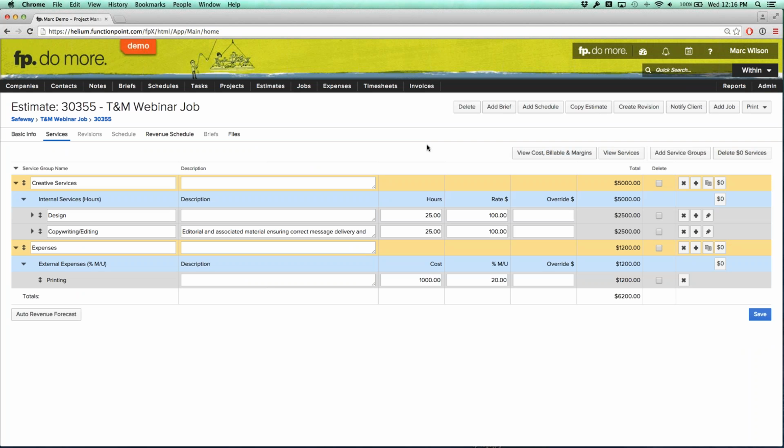One of the first things I do when I'm looking at an agency system is I do a job find for active, and I look at the estimated value column. And I really love seeing values in every single one of those. It's something that you want to do just as a best practice. Even if you're not really sure, just make a guess or pull up old jobs and look at how much you spent on those. You really, really want an estimated value in all of your jobs, preferably, but at least the ones where you can.